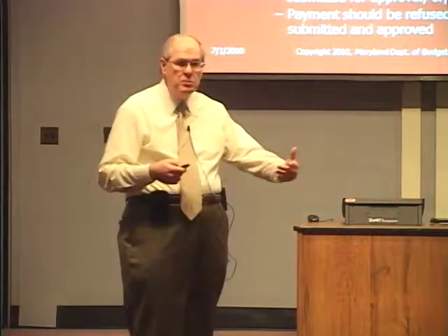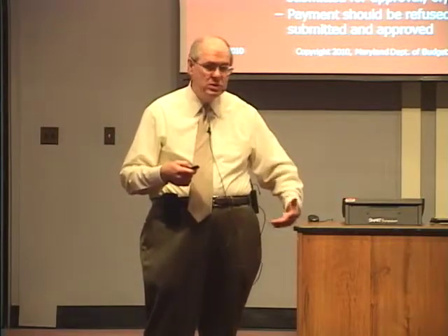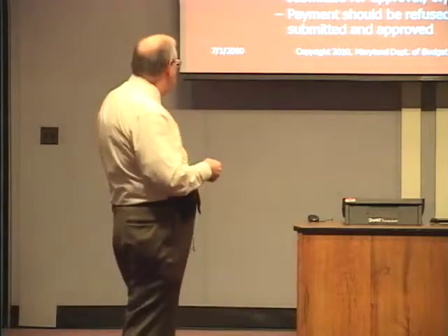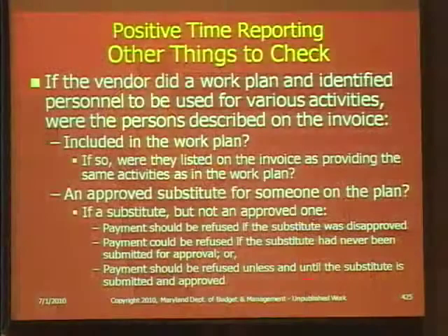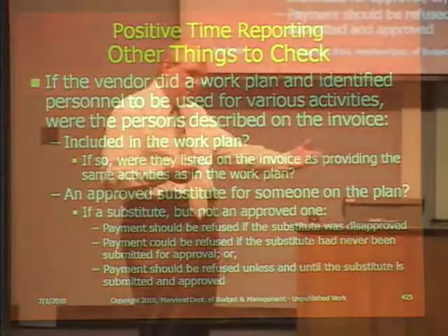But in the meantime, you've held up their payment, which sends a message to them, you're not getting your money, which they always want. And if you end up disapproving, you're not going to pay. You do it unless and until the substitution is submitted and approved. So just other things to get through positive time recording that you wouldn't get from, here's a bill.